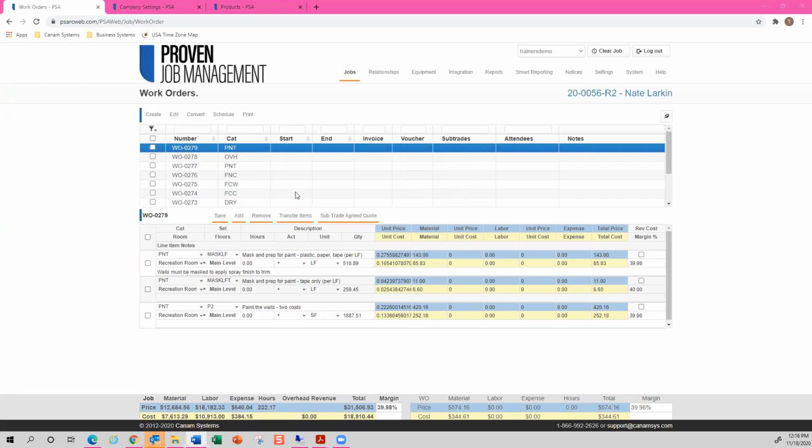And another thing I wanted to point out, when you import an estimate from Xactimate, your job type gross margin percentages that are set up within your company settings will not be reflected. Xactimate does not recognize those specific gross margins per job type that you have defined within your company settings. So you do have the option to override those imported margins because you want your yellow line items to reflect the budget that you are attempting to work within.